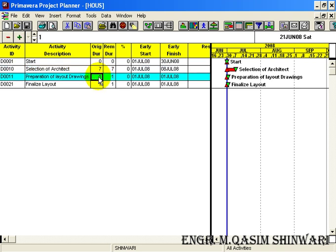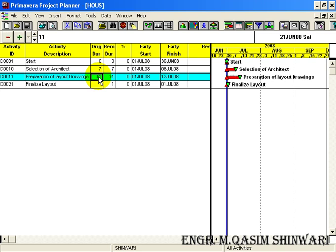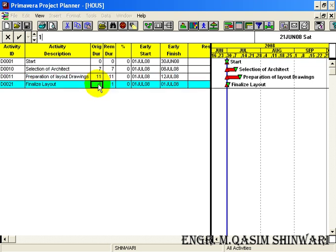For preparation of layout drawing we have 11 days, and for finalizing layout we have 15 days.